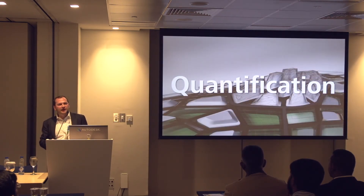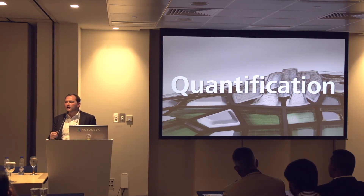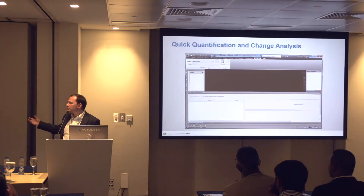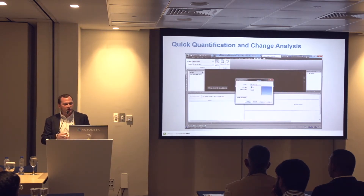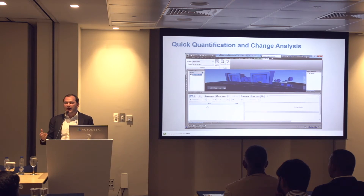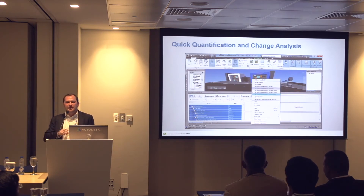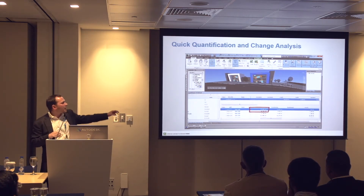The next area is quantification. This is something which typically the estimators or quantity surveyors look after, but there are many other people within construction and the supply chain who need to understand what's in the model. Just to show a quick tip: you can open any of your existing Navisworks models and literally drag and drop them into the quantification panel. You can quantify them against a standard catalogue, or just drag and drop the entire model and it has quantified everything for you — taking all the standard lengths, volumes, areas, and heights from a Revit model, DWF file, or IFC.